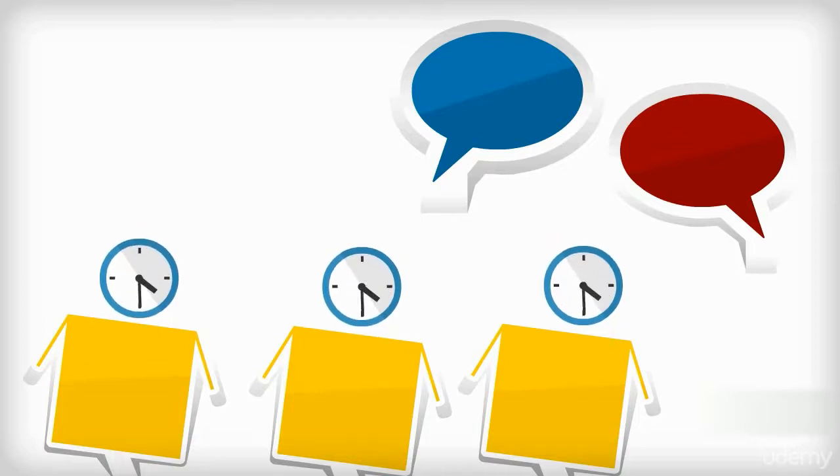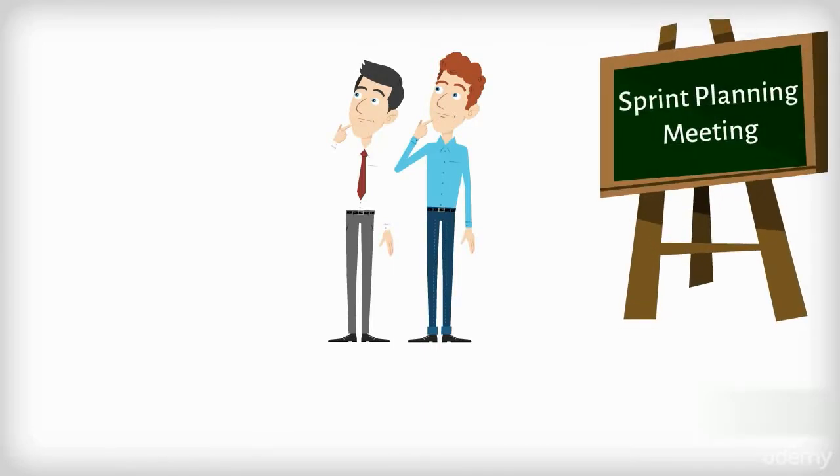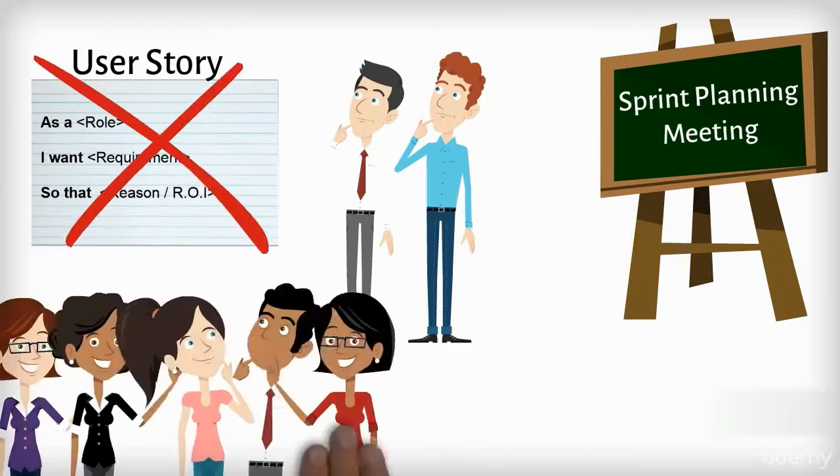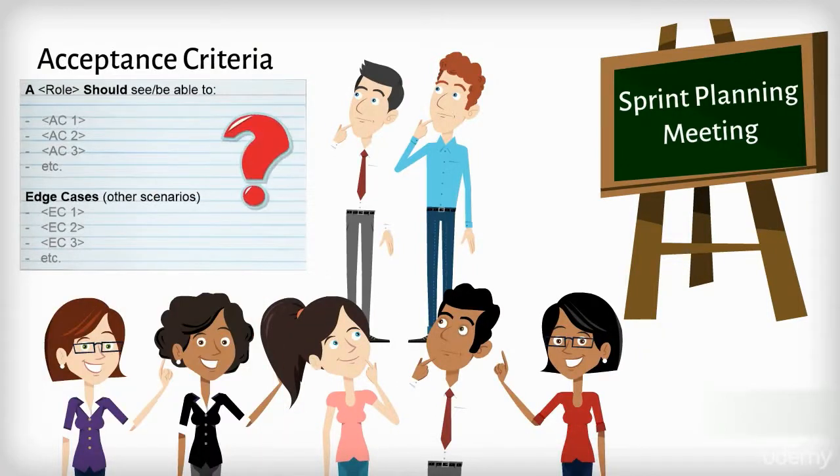Sprint preparation. There are often situations where background discussion is necessary to keep the Scrum time boxes running smoothly. For example, the Scrum Master and the product owner should work hard to make sure that the sprint planning meeting is not the place to find out that a user story is not ready for the team or that acceptance criteria is too vague. Do not get me wrong, sometimes this is unavoidable since nobody thinks like a team of experts. However, confusion should be avoided wherever possible.